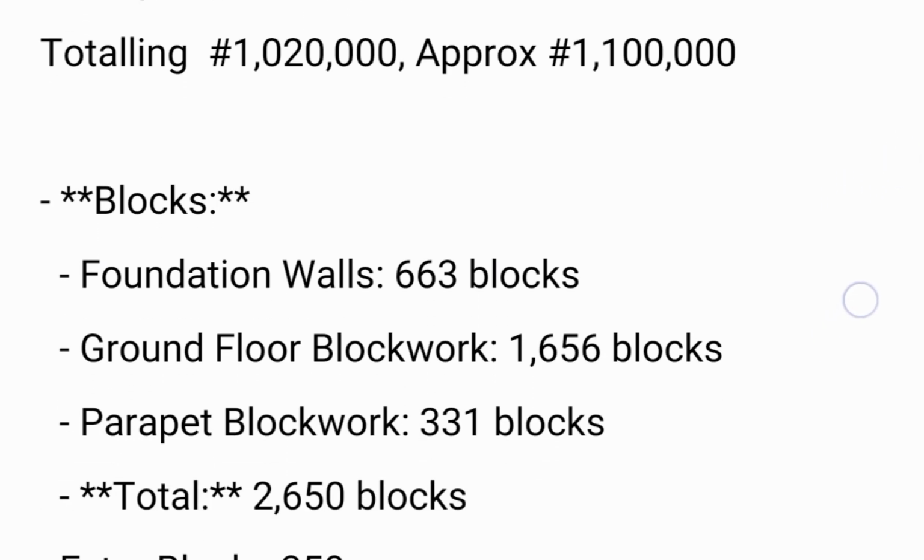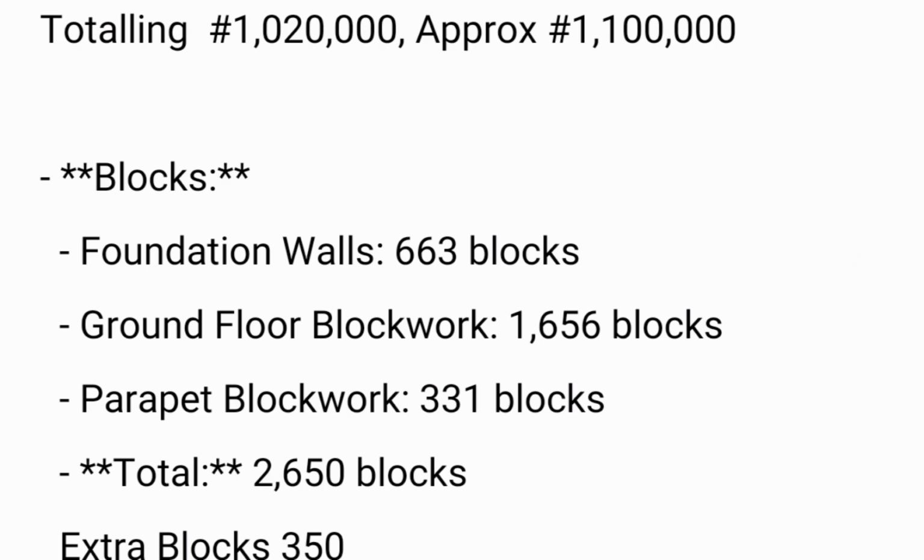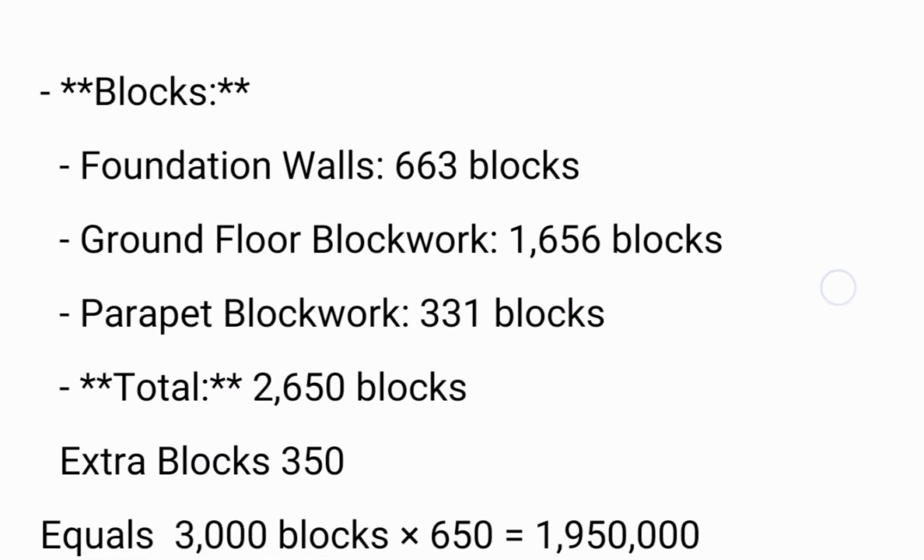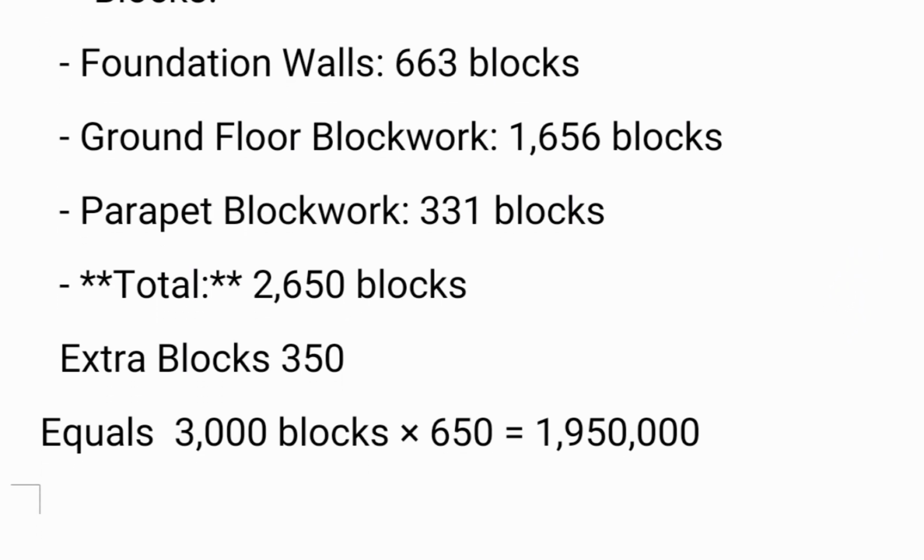Then blocks. Foundation walls, 663 blocks. Ground floor block work, 1,656 blocks. Parapet block work, 331 blocks. Then totaling 2,650 blocks. Extra block.